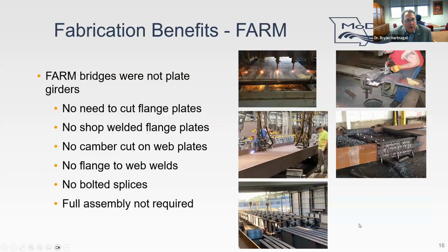Here are the pictures that I borrowed from my friend Gary Wish at DeLong's Inc. And he talks about the benefits of these types of simple bridge fabrication. And the fact that it was a bundle and they got to build 25 of these, he said the first one they probably wouldn't have made money. The second one they would have broke even. And on the next 3 through 25, they got really good at doing these.